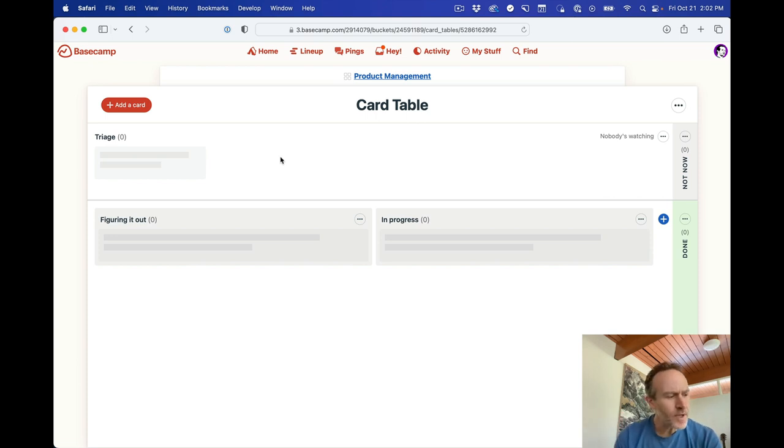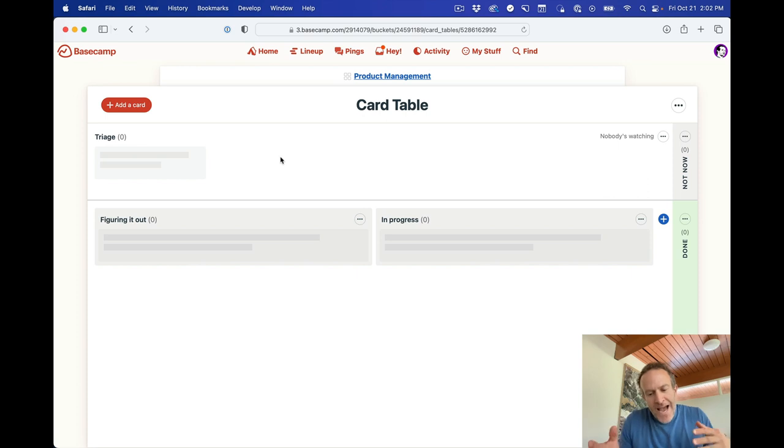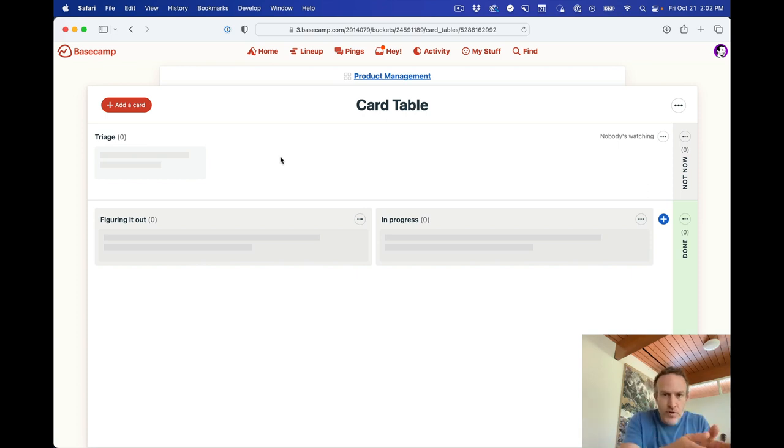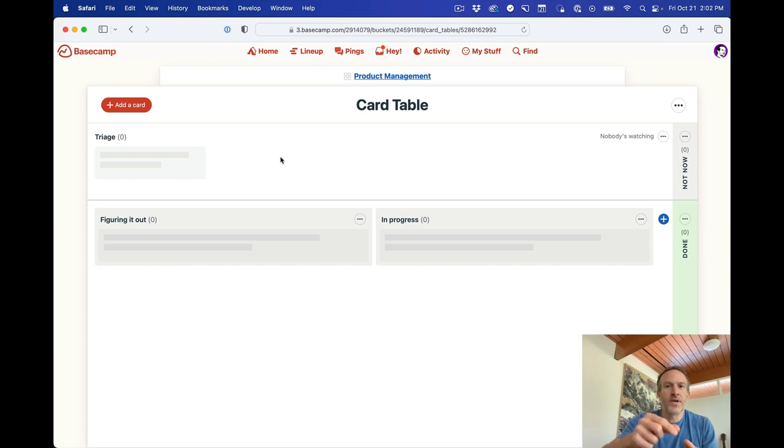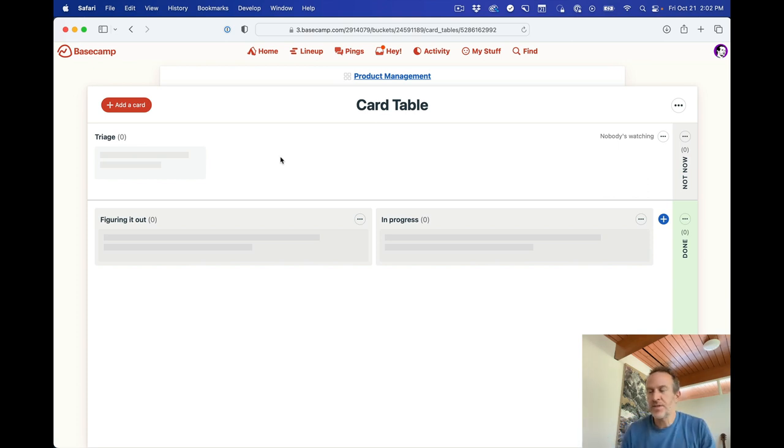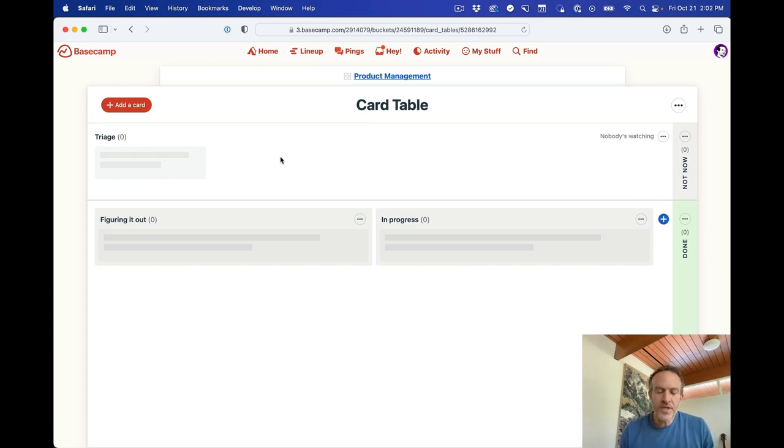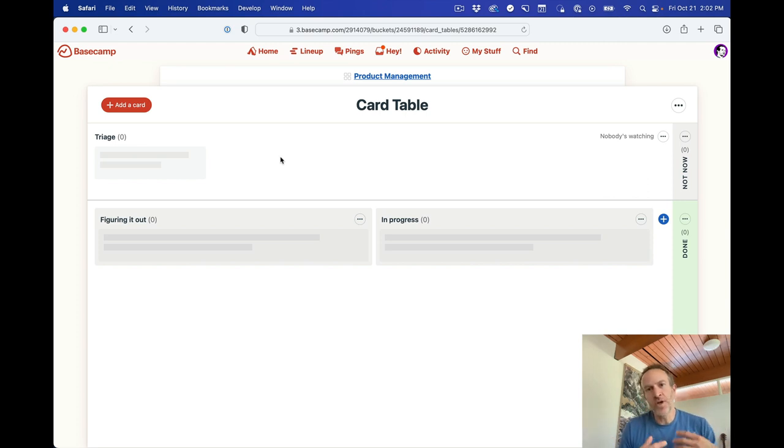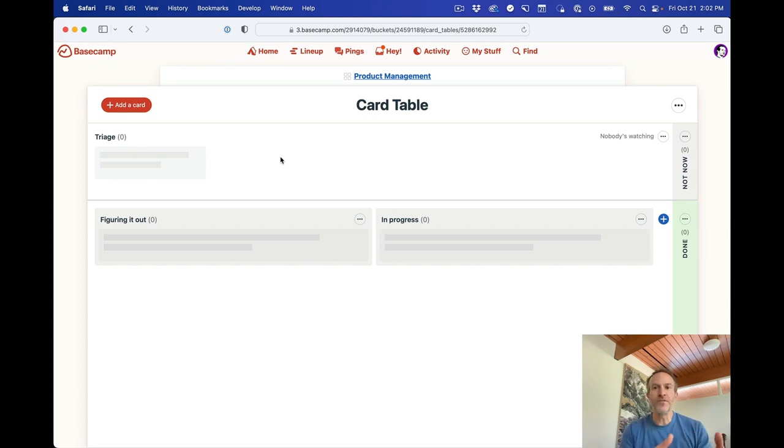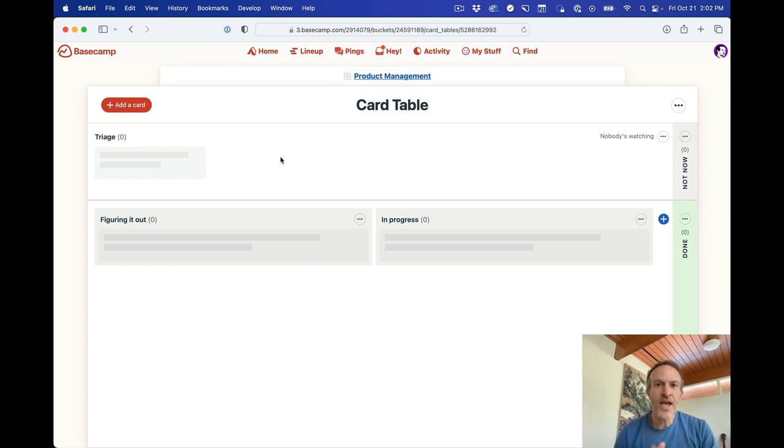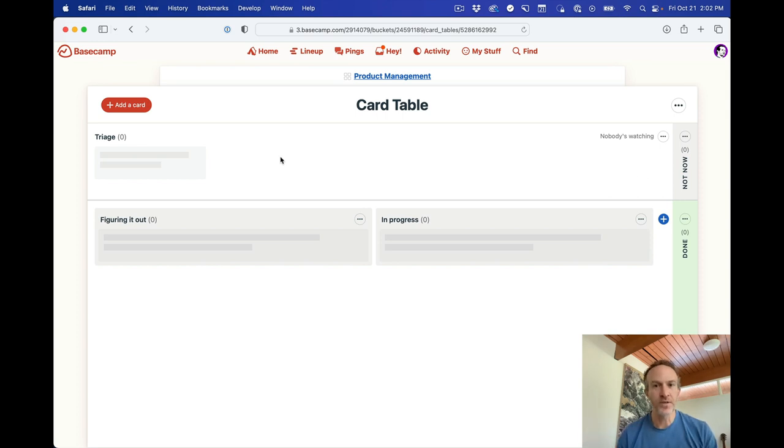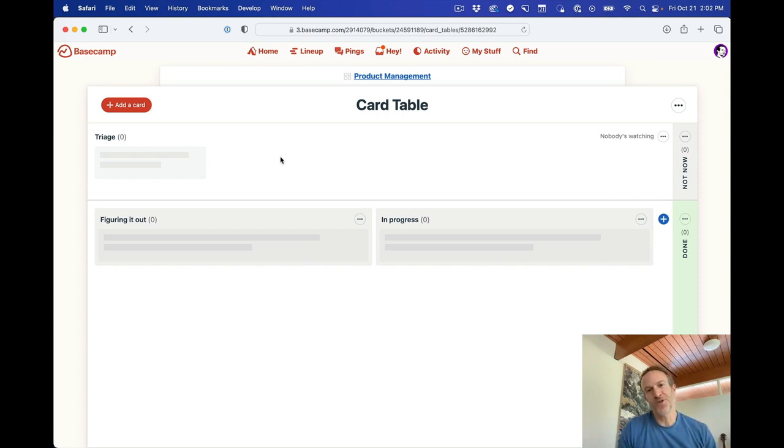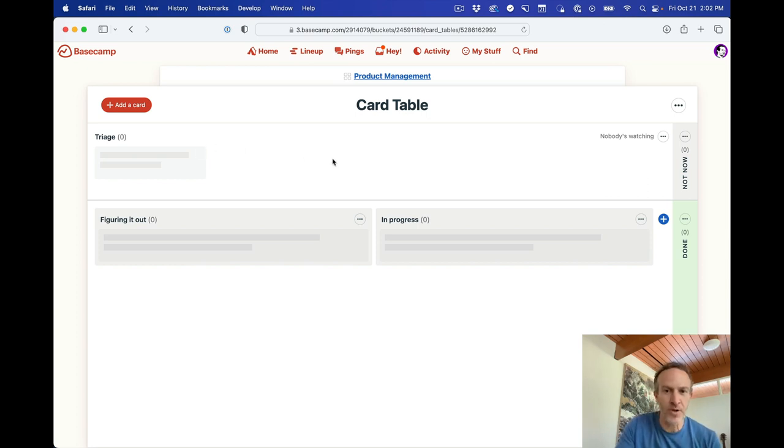Well, in a lot of Kanban setups, you'd start by adding something to a column, and then you'd move a card through the columns as a workflow or a process. The thing is, the way we see it is that the columns should be the actual workflow. And before you decide if you want to do something or not, it shouldn't live in the workflow. There's a prior stage to the workflow, which is consideration. Do we even want to bring this into the workflow or not? And that's why we have a section at the top called triage.